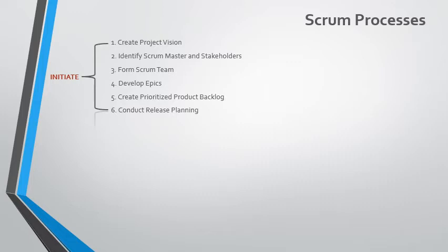The first process in plan and estimate is the creation of user stories. The product owner or the business analyst creates the user stories, and as much as possible, the acceptance criteria should be clear prior to the sprint planning, as they will be the basis for the estimation. Then once the user stories are already created, the team can now do the sprint planning.